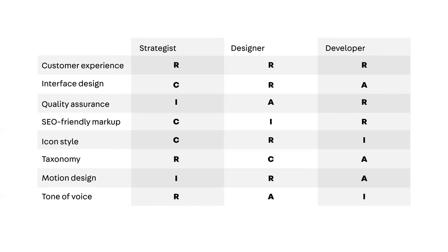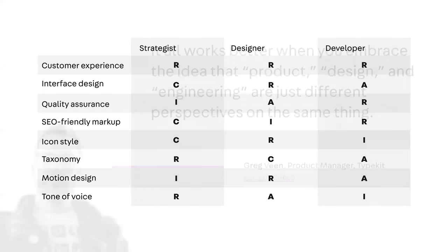When I'm coaching teams that start out pretty non-collaborative, their RACIs have a lot of R's and I's, right? Not a lot of middle. And then as they get collaborative, you see more A's and C's get in there. It creates this overlap. It sort of forces the collaboration, but in the best ways.